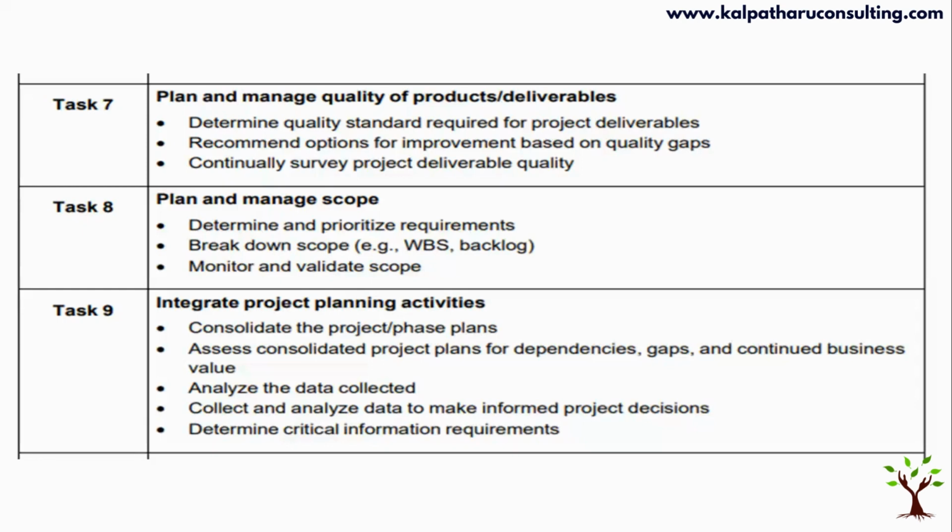So you collect the requirements, you prioritize the requirements, and then you come out with the project scope statement. The project scope statement is going to be detailed. The document may run for pages after pages. Hence, we need to break it down into smaller components to facilitate estimation and to delegate the work. That is where we break down into the work breakdown structure.